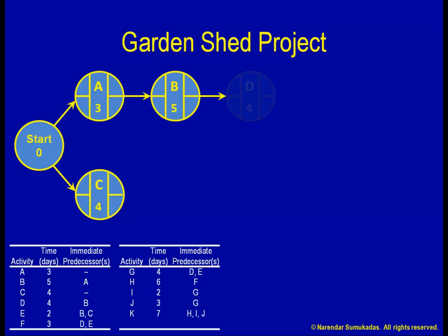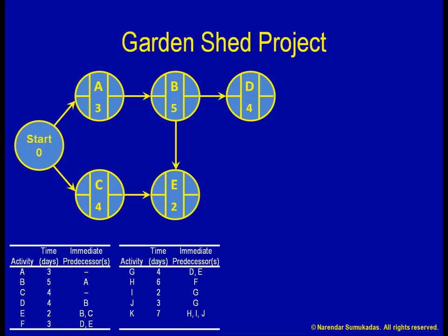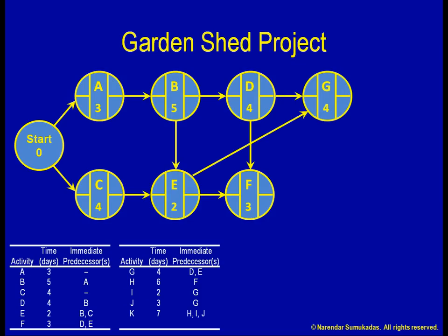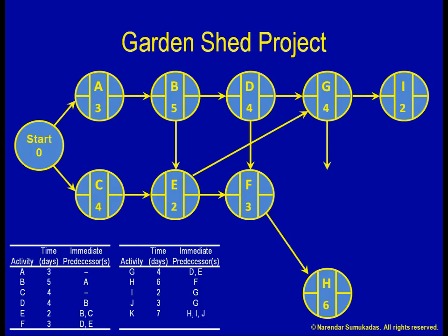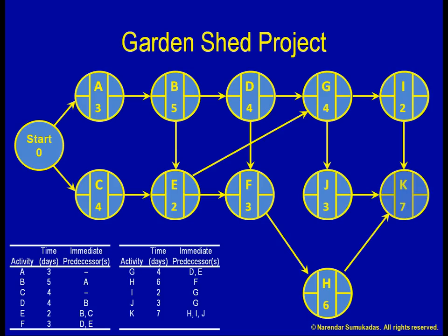Activity D depends on B. E depends on both B and C. F depends on both D and E. G depends on both D and E. H depends on F. I depends on G. Finally, K depends on H, I, and J. Our project ends with K, so we don't have any loose ends on this side. If we did, it would be good practice to finish with an end milestone.